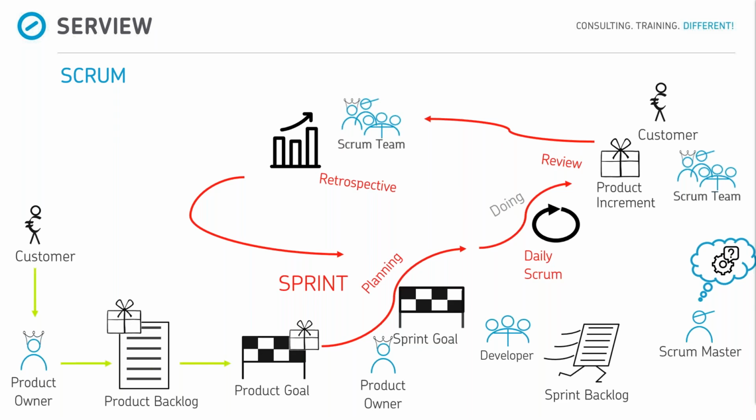I think these are the best pros for this framework, but we also have negative aspects, or cons. For example, we have no sprint 0 or an initiating sprint or something similar. So the first sprint is often very difficult and goals are often not achieved, because first you have to know the approach, feel your way around, and warm up with the team and product. You have to know each other. You have to become a one-team culture, and that takes a little bit of time and maybe gives you another focus in the development.